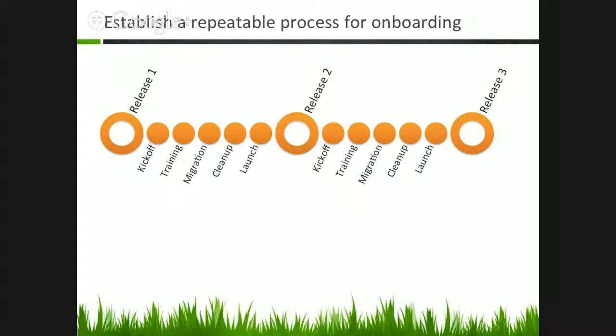We're doing it twice. First to content staging, where we look at how the content is moved into the system and make any initial changes, and then to the production environment so that we can go in and make the final changes. Once it's in production, we do some cleanup initially, and then with the components, we have an all-day content cleanup session where we sit down with them side by side, walk them through what they need to do to fix up the site and get it ready for launch, and then finally launch once everyone's in agreement. And we repeat that starting again the next time.